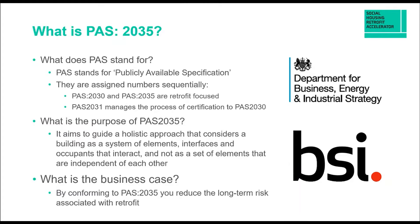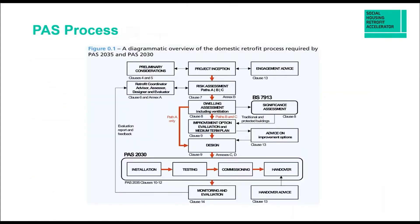PAS2035 is the standard that installers delivering retrofit projects work to. Its purpose is to guide a holistic approach that considers a building as a system of elements, interfaces, and occupants that interact — not as a set of independent elements. The idea is that the building is considered as a whole, and each element is assessed for how it interacts with other elements you may install now or in the future, to make sure you work to a right-first-time principle. PAS2035 aims to reduce long-term risk by standardising the approach across the country.